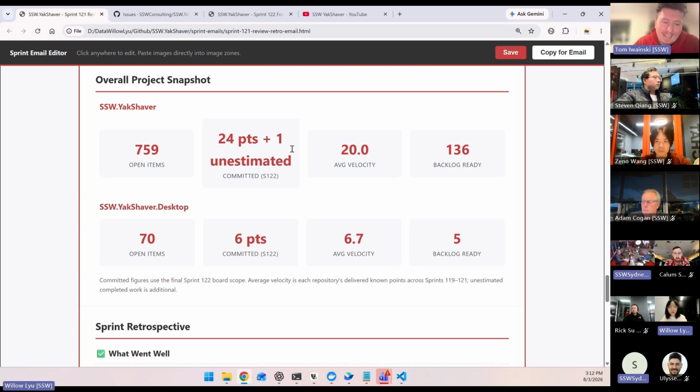Yeah, let's start that from scratch, wipe everything. No, we will not do that. But my favorite solution is, when you do an item such as the leaderboard, search the backlog for the word leaderboard and review those at the same time and get rid of some of those.